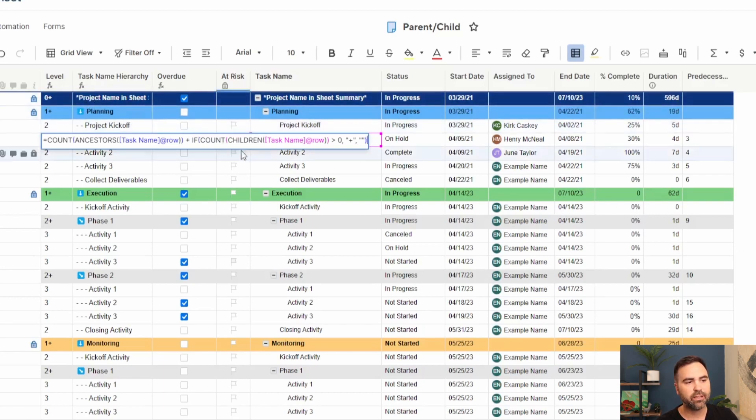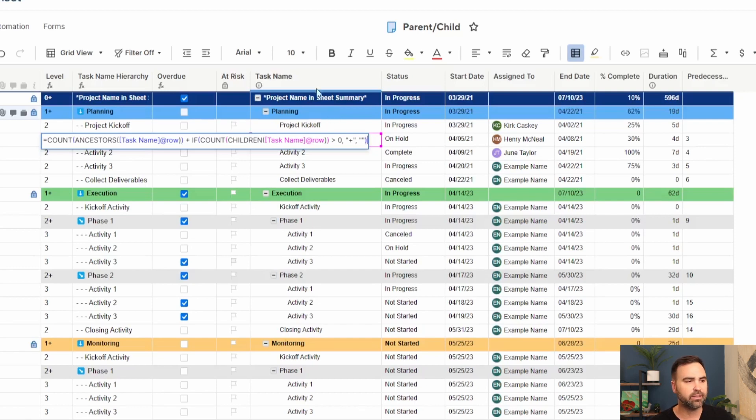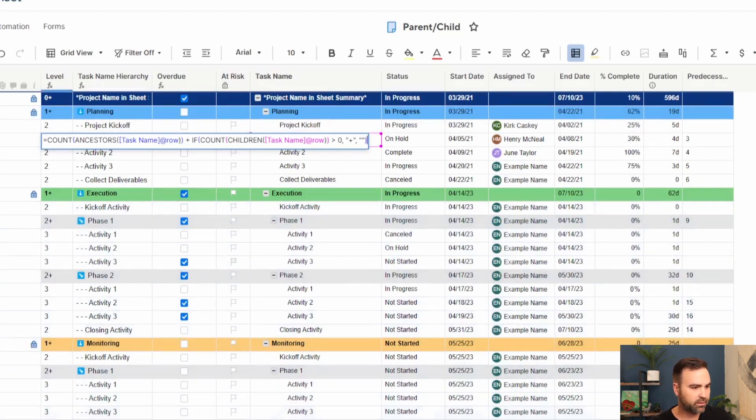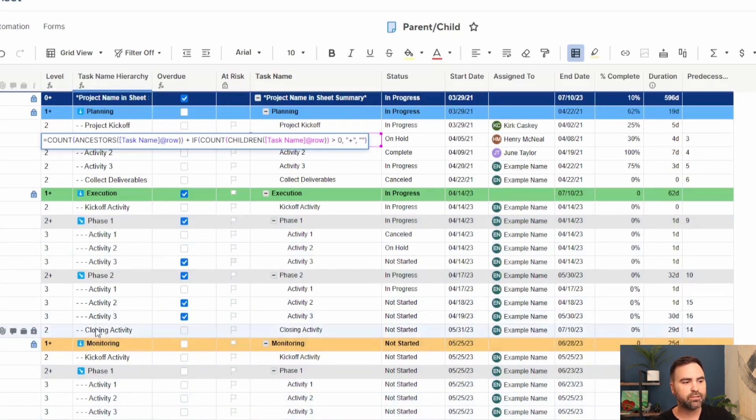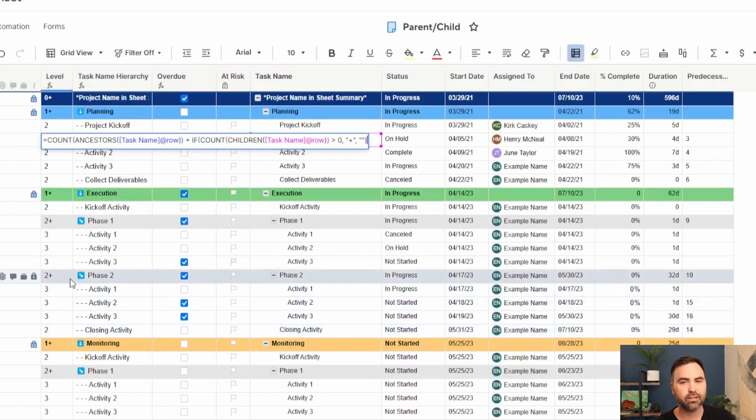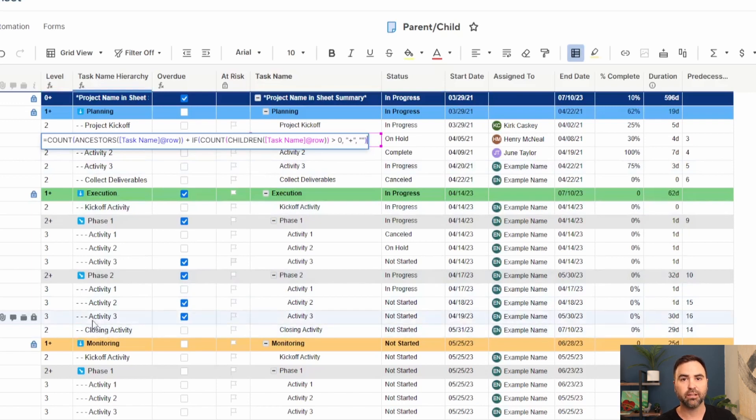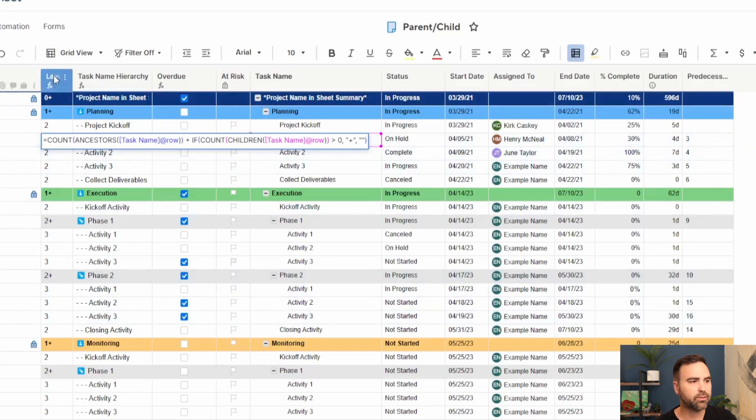And then we count the number of children in the task name at the row. If it's greater than zero, then we add a plus. So what this does is this tells us that even though I'm on the second level of a hierarchy, if I have children, then I need to know that I need to identify that by my level number. So if you can see, here's an example. This closing activity is actually level two of the hierarchy, but it has no children. So it doesn't have a plus. You can see level two is also not color coded gray using our conditional formats. So level two is actually the lowest level of that node of the hierarchy. That's the level column.